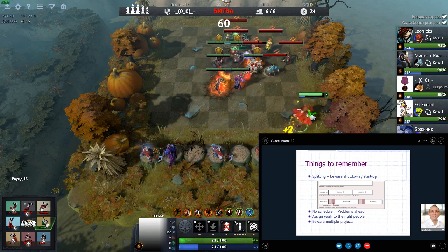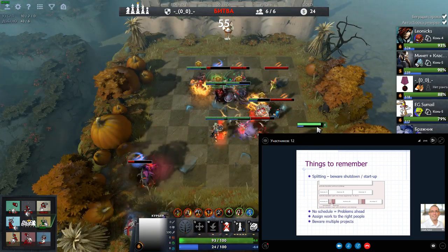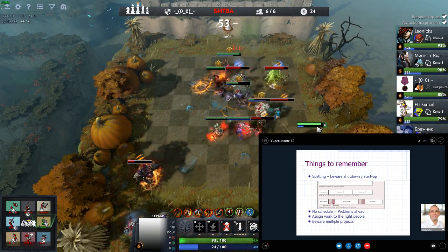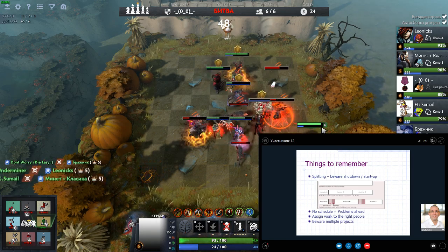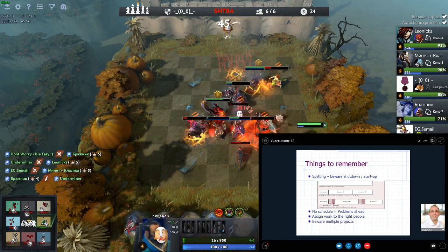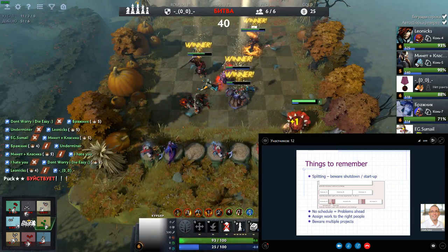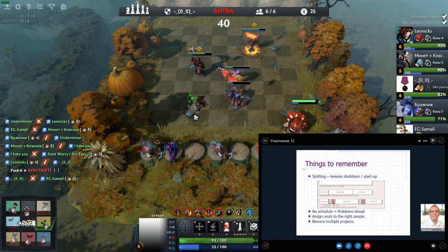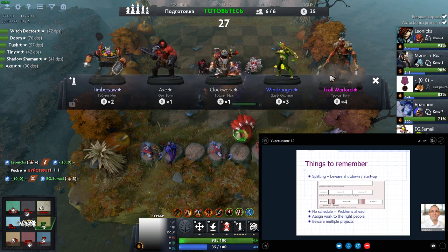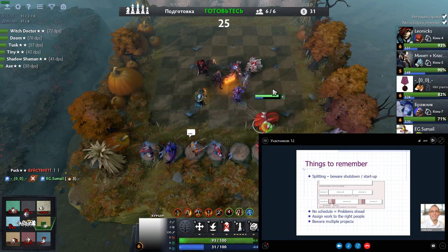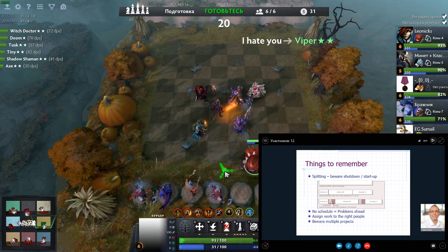Now, if we're thinking about this idea of splitting, why is it not such a good idea? Well, the graphic on the screen shows you why. If you start splitting things up, what tends to happen is you introduce additional delay, because you have shutdown activity and you have startup activity. And whether that revolves around getting equipment or around people, all it does is lengthen the time the project can take to be completed.